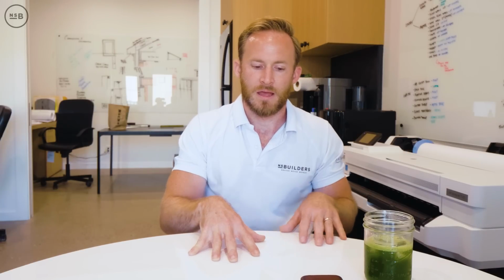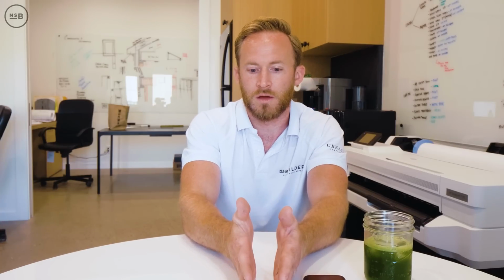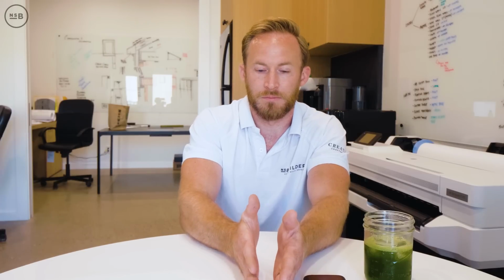This is where it's different, and this is why we bring in pre-construction, and why I wanted to dive into that in the beginning. On pre-construction, say it's preliminary design, we start outlining that preliminary design and working line by line on what things cost. Our goal there is to help unfold the design and the scope, and get as many of these questions answered as possible so we're delivering a budget that is really, really accurate. So we're coming to a point where it's very close to a fixed cost. The reality is, at this point, if we've done our work, we could sign a fixed cost contract and be in good shape because we've done all of this homework to really price everything.